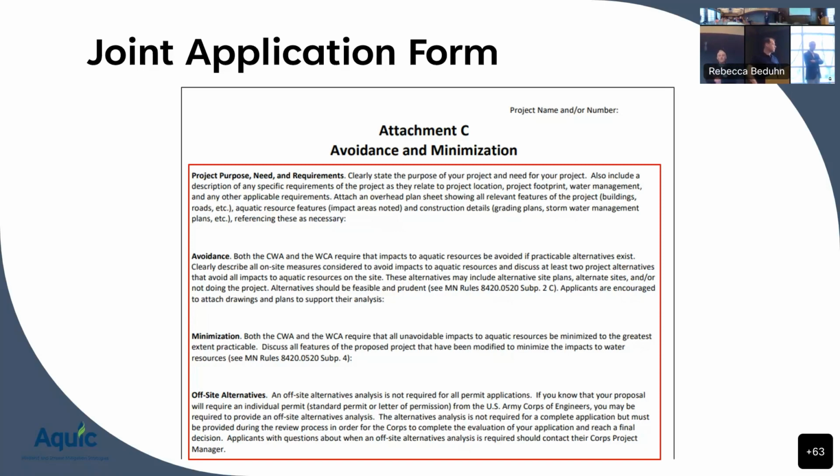Underline, bold, italics. The most valuable time spent in any permit evaluation is before the permit application. I'm preaching to the choir here. There's nothing more frustrating for everybody involved than for every single consideration to be figured out, all the layers figured out, and the last thing is, well, what about the wetlands, and then throwing in a permit application? So, okay, you need to back up about 40 steps. Why here, why this? On the whole alternatives analysis, you've got to back all the way up.